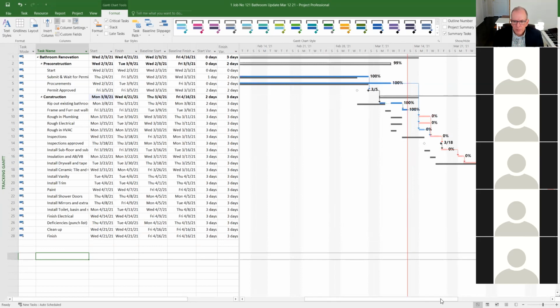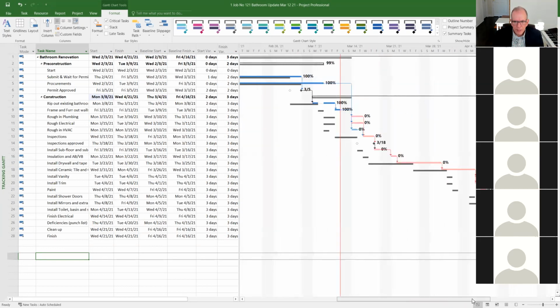This is another little bit of advice. Some of you may get frustrated. If I mark this as complete and then I start changing dates on this, it'll push these, but it won't push this because you said this is complete. So once you mark something ahead as complete, you've got to be careful because then things behind it will just push out past it, right? So you've got to watch out for that. That's all.